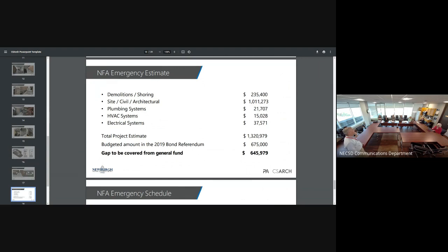Yeah, we knew this was gonna be more than what the budget was, but that budget was established 5 years ago, 5.5 years ago. So we knew it was gonna be different, and then, I don't know whether that budget contemplated doing the stairway, which probably didn't, but to try to excise that slab without doing the stairs, you just couldn't do it. I mean, the stairs are falling apart to begin with. So I just think we need to do the whole project and have it done and correct some of the other things that are problematic from safety, supervision, lighting, everything else.